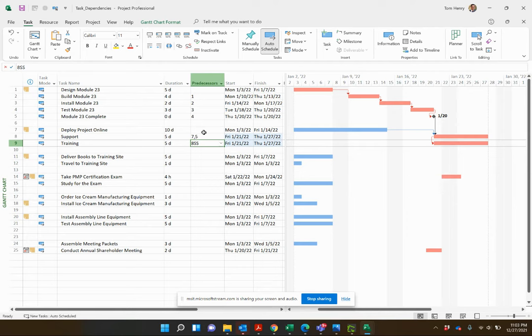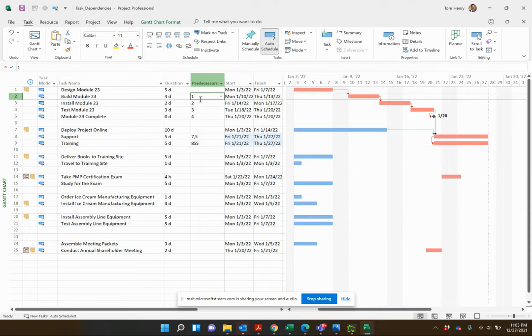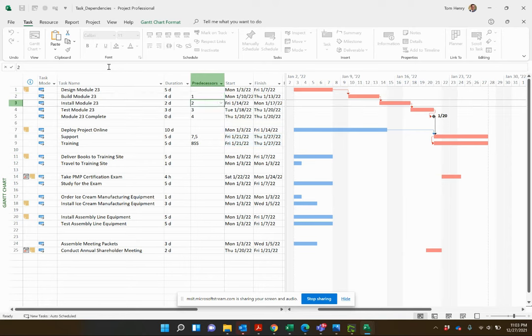Sometimes I'll type predecessors directly when doing something a bit more complicated. You might be wondering why the Predecessors column doesn't show 'FS' for finish to start — the default relationship where one task finishes and another can start. Microsoft Project does not show it because finish to start is always the default. You do not need to type FS. If you type it, it just defaults back — as you can see.